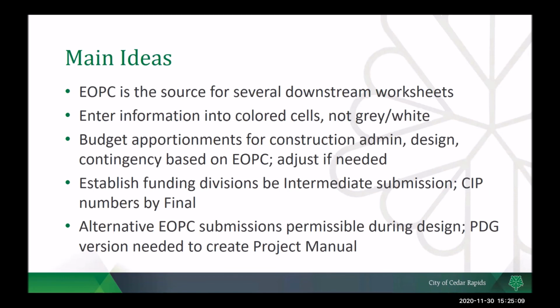As a reminder, at the preliminary level, you don't necessarily have to have funding divisions figured out. But by the intermediate, we want to know the different funding categories, if not the numbers. And by the final design submission, we do want to know the CIP numbers.